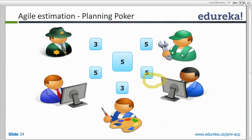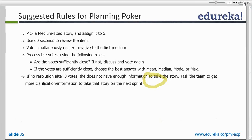Each team member is given a complete deck — he would have all the cards with numbers 1, 2, 3, 5, 8, 13, and so on. On a big screen, the Scrum master would have all the requirements listed by priority. The Scrum master would read each requirement one by one and the team would estimate it together in a common room.